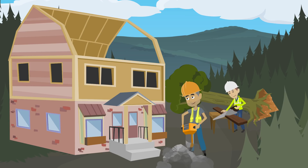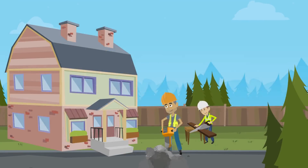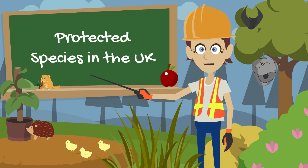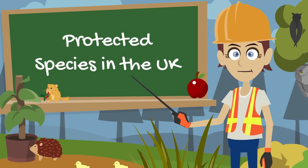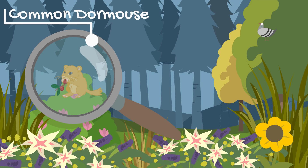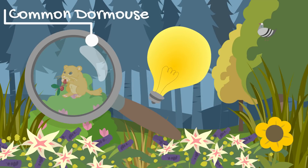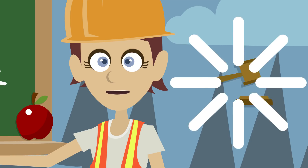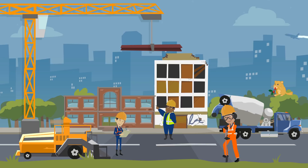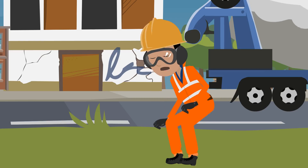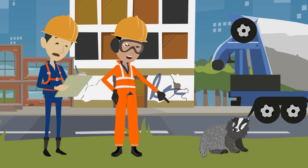In construction we come across a wide range of biodiversity on both green and brownfield sites, particularly if a site has been left undisturbed or derelict for some time. We're going to go through some of the more common species which are legally protected in the UK, to help you identify them and know what to do if you find them. If you ever find what you think is a protected species, stop work as soon as safe to do so and report it to the site manager or site ecologist if you have one.